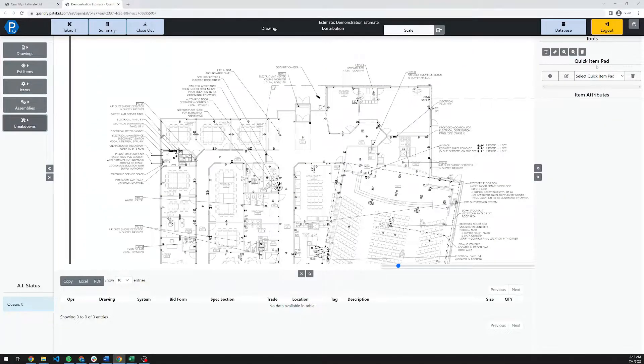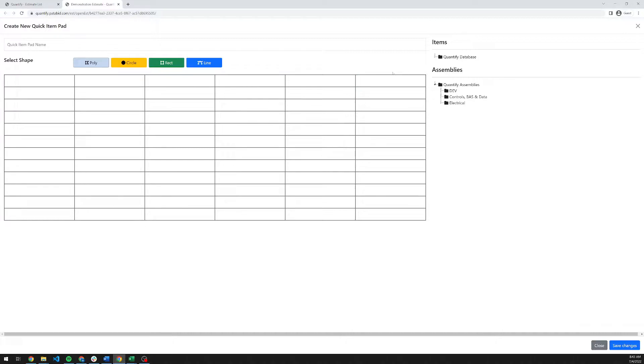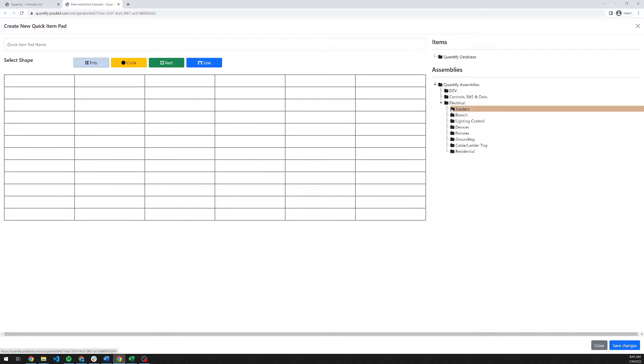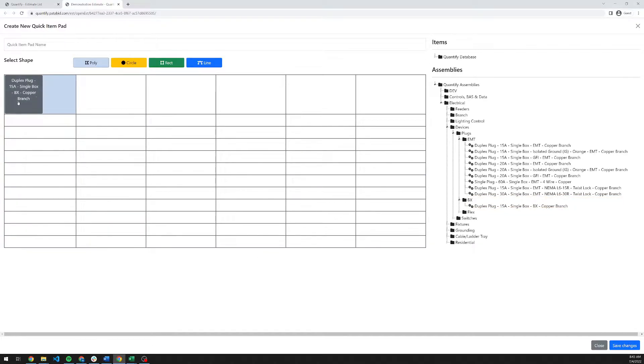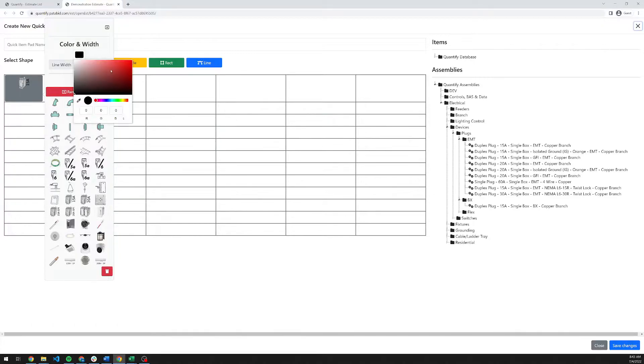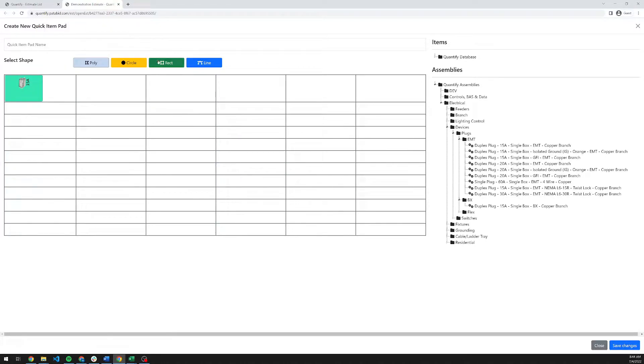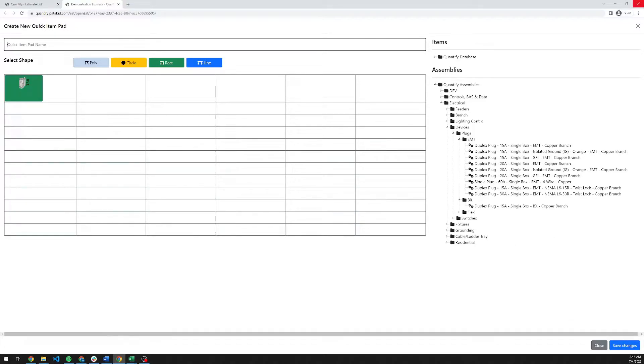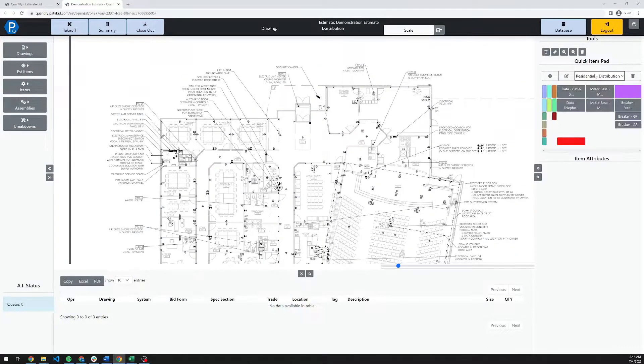Down here is the audit trail. This is where everything that you take off will be issued out as an audit for how the estimate is progressing. On the right-hand side are some quick items here that will dramatically improve how fast takeoff can be performed. We have quick item pads. Quick item pads are just shortcuts into the database. Companies can create custom quick item pads. There are a set that also comes when you sign up. Basically it's just drag and drop to bring in information. If I were to grab a device assembly here, BX for example, drag this over, it creates a button in here.